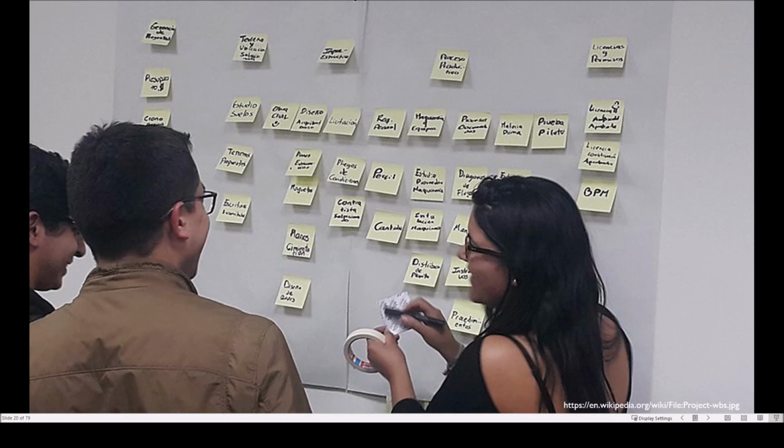And there are lots of ways that we can go about doing this, but I just want to show you this diagram just to sort of say one of the most common ways that we go about developing a work breakdown structure, particularly with a project team. So as a project manager, you want to get your team together, and if it's appropriate, help them in terms of breaking down what needs to be done. One of the most popular ways is just simply with a couple of different packets of post-it notes and some markers, and getting the team together and saying, okay, what are the big chunks of work that we need to do? What for this particular deliverable or activity, what are the tasks that we need to do? How long do we need to do that?